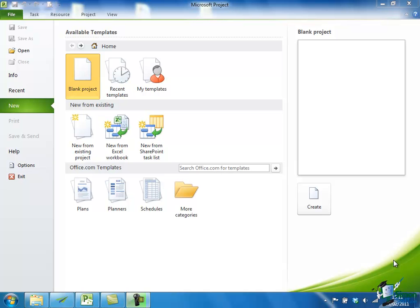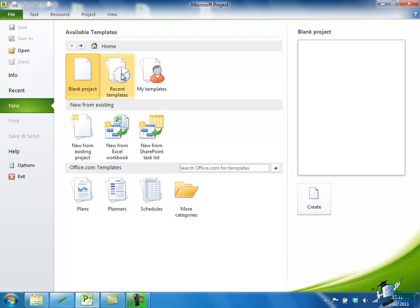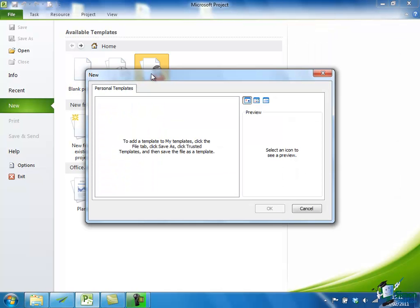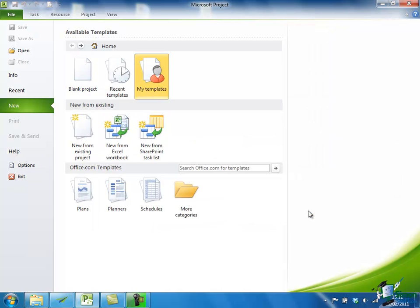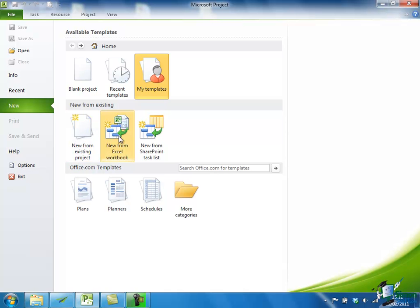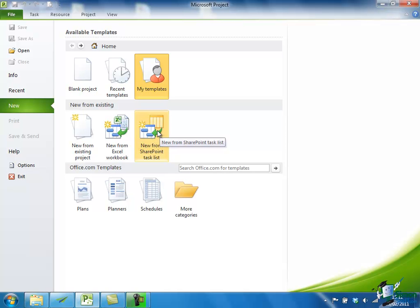When we request a new project, we have a number of options. We're going to use blank project, start from scratch with this one. But if we'd created projects before and saved them as project templates, we could access those templates from the Recent Templates list or My Templates. We can also create a project from an existing project, from an Excel workbook, or from a SharePoint task list.